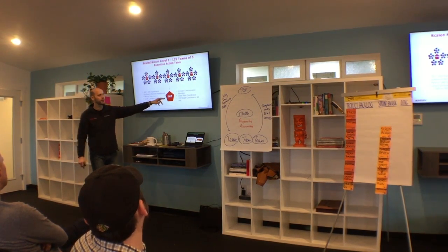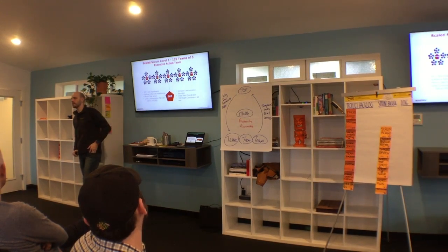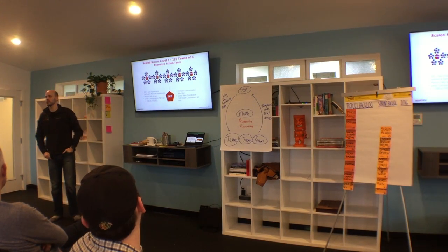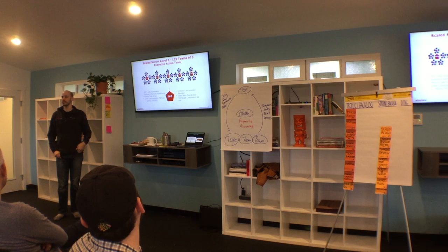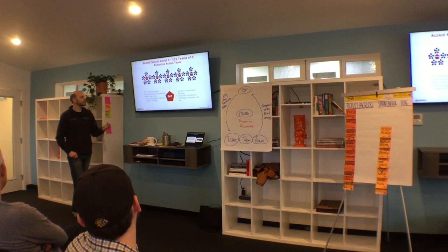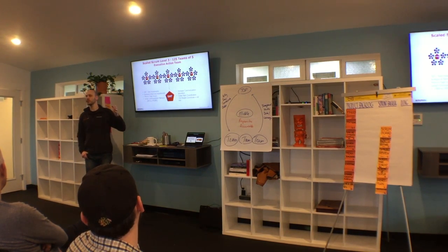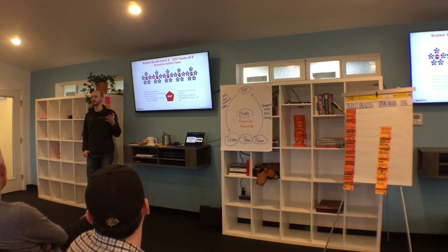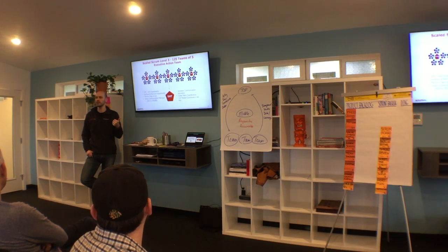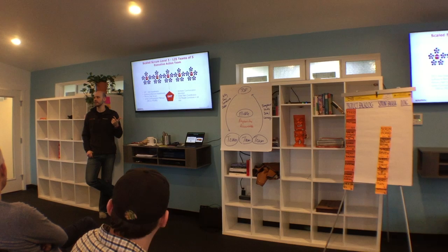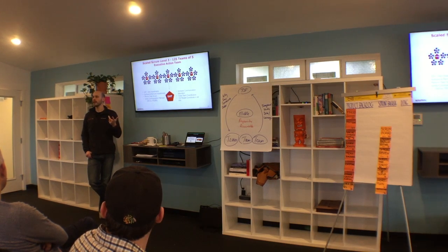They present in front of what is called the Executive Action Team. And present is the wrong word. They have scrums, and the attendees are 5 Scrum Masters and the Executive Action Team. The Executive Action Team is a group of executives who have authority up to reorganizing the organization. So at least one person is from human resources there, at least a CXO is there. Who that is can change. It can fluctuate, that's fine.